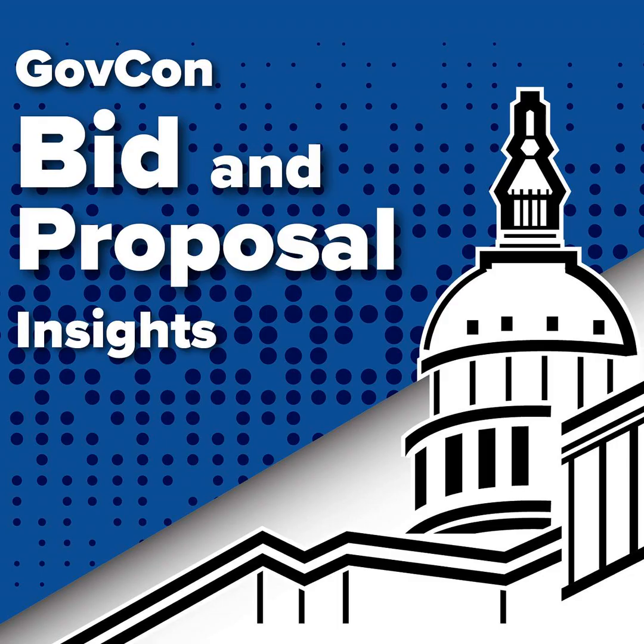Absolutely. And one more operational point: when a company develops, say, new software or generates important data for NIST under this contract, who owns it? What about the data rights? That's a key point. The government requires unlimited data rights for all the deliverables created under these task orders. Unlimited rights. Yep. So basically, any new intellectual property, any data that's generated as part of the contract work, belongs to the government. They need to be able to use it, share it, build on it for the public good without restriction. Makes total sense for public work.